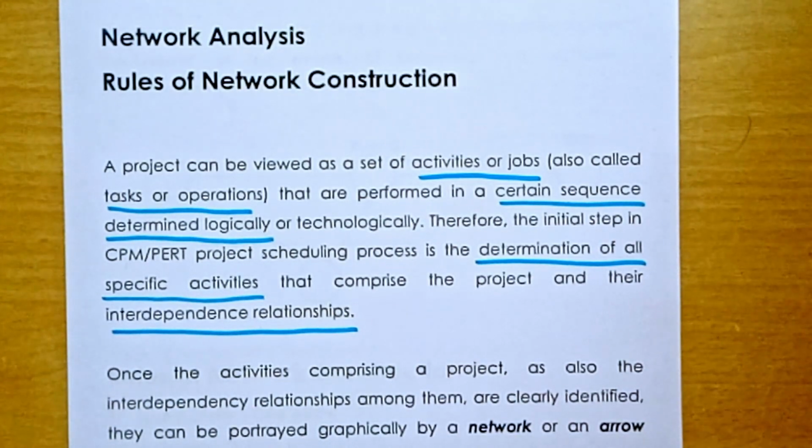Laying the foundation and other activities like laying pillars will get delayed if material procurement is delayed, or say drawing the design itself is delayed. So each activity is interdependent, right? Interdependent, and this is called interdependence relationship. One activity is related to another activity. We will see that in detail later on.